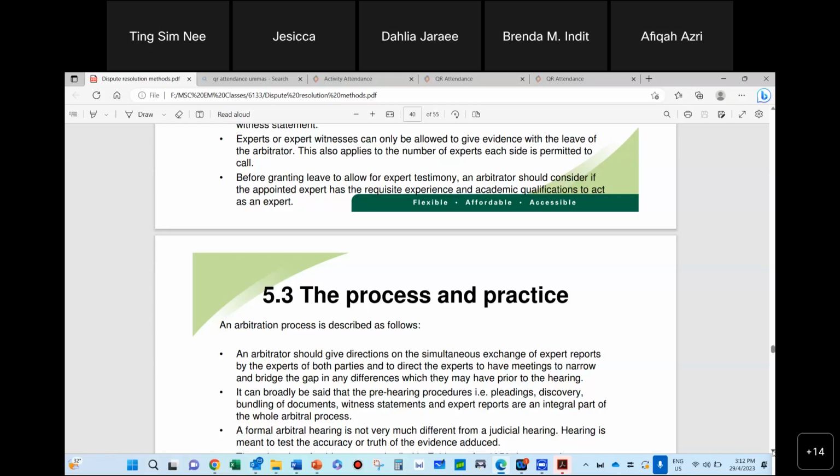Not, correct or not? Yeah. If I say, okay, let's do it with an Indonesian court, Malaysia wouldn't want to go there. It's not my home ground. What is applicable to my country is not applicable to your country. So litigation is completely out if it's an international contract. So what's left, something very close to litigation, a formal court hearing, is arbitration. That's why for international disputes with international contracts, you have to go for arbitration.